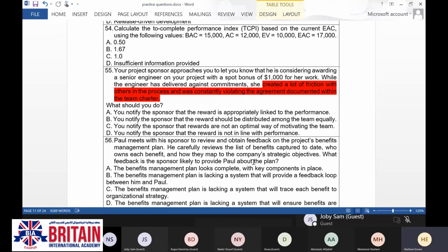So the critical path, okay, then any activity on this critical path is going to have float of 0. So the late start is going to be equal to the late finish. So I don't need to draw and spend like 3 minutes or 4 minutes in calculation. Keep these minutes which you are going to waste in a question like this for others.